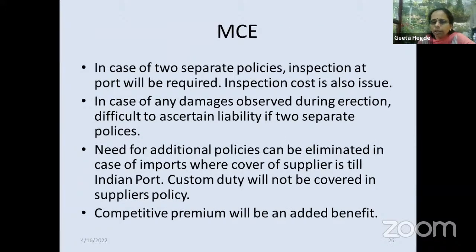In case of two policies, inspection will sometimes be required if there is a gap between the marine unloading and sending to the site for erection. Damages also, whether it falls on which policy. The need for additional policies can be eliminated where the supplier's marine policy gives only limited cover, like custom duty is not covered, or the supplier's policy is not an A policy, it's a B policy. In such cases, the marine cum erection policy will remove all these difficulties. Competitive premium also can be given because we have both the covers with us.